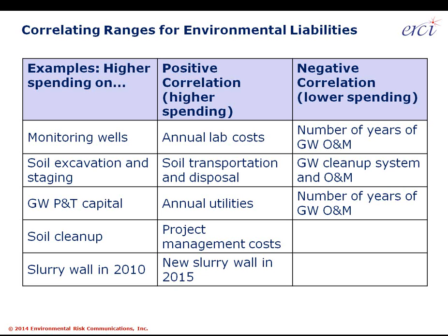The negative correlation, if you have more monitoring wells, is that you may have fewer years of groundwater pumping treatment. In other words, if you're expanding the operations and maintenance duration, if you're adding more wells, you're probably going to be able to count on finishing the groundwater remedies sooner. Let's just step back for a second and say if you're just putting in more monitoring wells to collect more data, you still haven't got the problem identified. That's something else altogether. But if you're in a late stage and adding additional wells, you're probably in a position to declare either technical practicability or that remediation essentially has been complete.